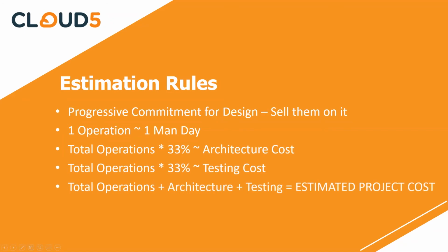So this gives us a formula. And the formula could either be just bare bones, like you see it on the screen, or at this point, I can provide a contingency. The formula plus the contingency at a bare minimum gives you some science to talk to people, instead of you going and saying, I believe it's going to take 3 months, just to realize that what you just signed up for takes 3 years.